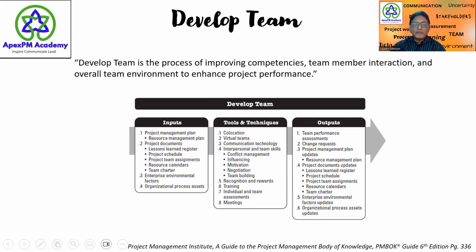This is the develop team process. Some of the tools used are co-location, where teams are brought together within the same location. You have communication technology, and then you have the various interpersonal skills like conflict management, influencing, motivation, and negotiation, and team building. Outputs are team performance assessments, change requests, and project document updates.